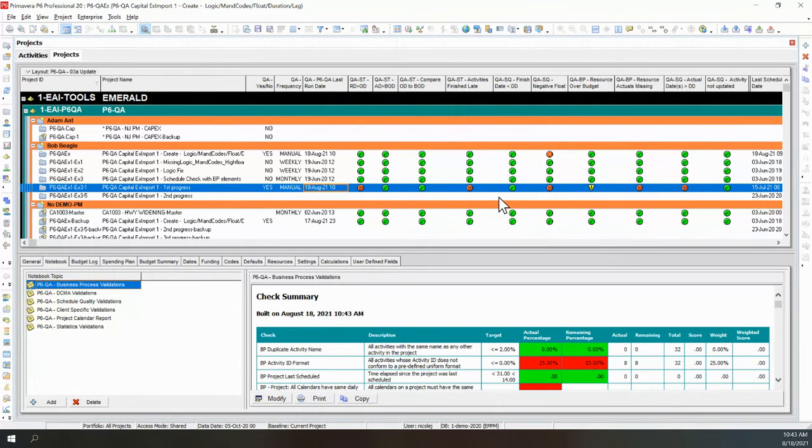Okay, there we go. We've got some flagging here. So we can see some activities are running late. We've got some durations that are growing compared to our original. We've got some negative float. So that means we're trending to be late on our project, and we need to see that. We need to do something about that.